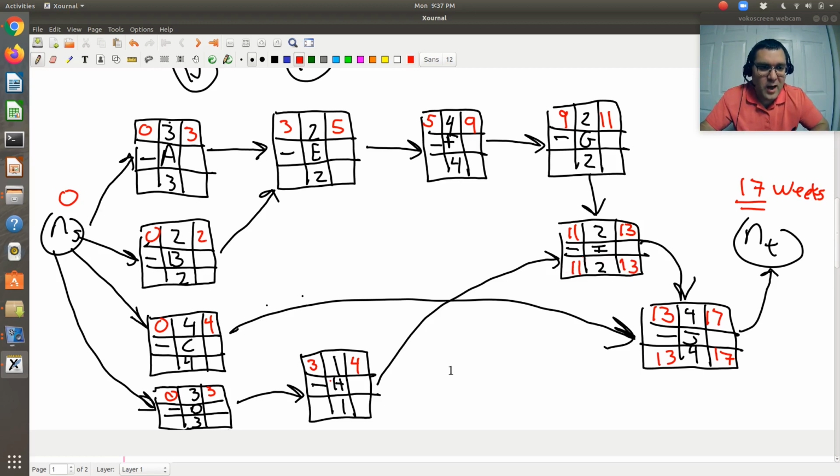All right, so basically I needs to begin by week 11 and end at week 13 in order for J to begin on week 13 so it can end in week 17 so we can complete this project in 17 weeks.